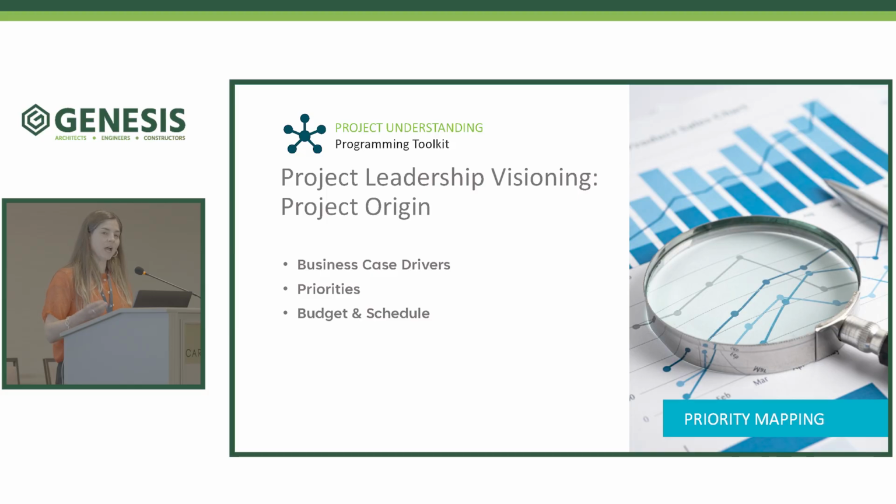So understanding how those influence and are factors in the priority mapping exercise is really key. So priority mapping gives you a documented foundation as well that you can return back to throughout the project. So when things do change or somebody wants to change direction, you have a reference to return back to and understand how that will impact the rest of the project.